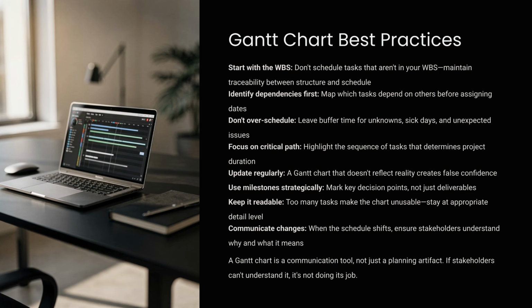To use Gantt charts effectively, start with the WBS and identify dependencies first. Focus on the critical path, update regularly to reflect reality, and use milestones strategically. Remember, a Gantt chart is a communication tool.